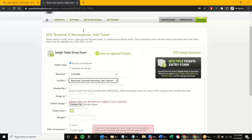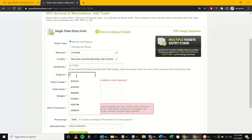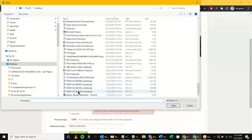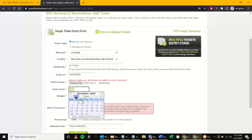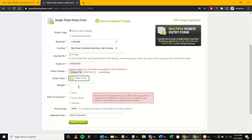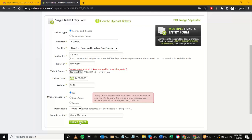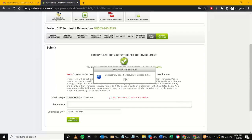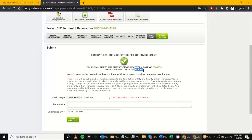The concrete went to Bay Area Concrete Recycling, hauled by A1. Ticket number 444-555-666. Date: November. Weight: 18.44 tons. Notice we can enter in cubic yards too — a lot of concrete crushers provide cubic yardage like four or eight cubic yards. But in this case we have the weight, so we'll submit ticket. This should put me over the requirements, and now I'm at a higher diversion rate — everything looks good.